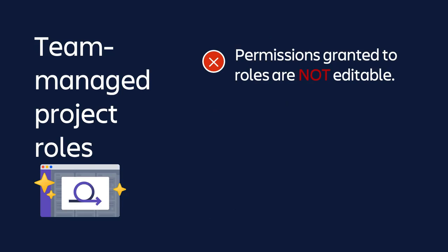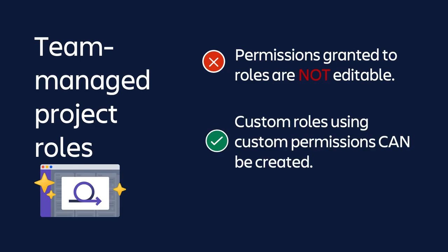It's not possible to edit roles, rename them, or change the permissions that are granted to these roles. However, it is possible to create a new custom role. You can give it any name and grant that role the permissions of your choice, using a combination of the 4 permission categories we covered earlier.